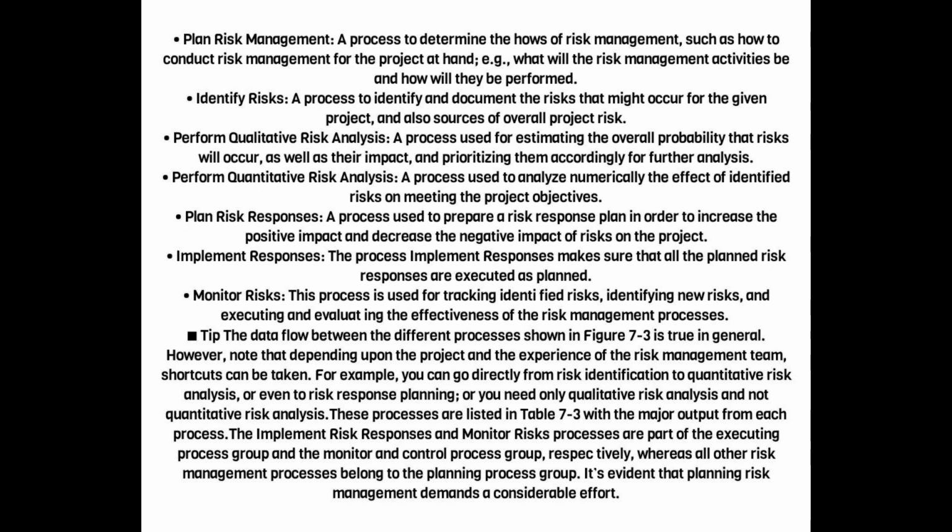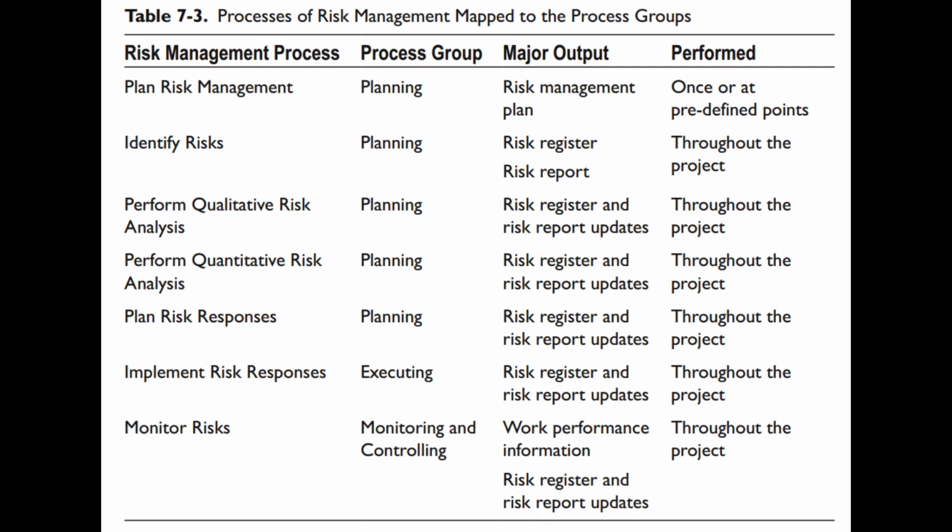The implement risk responses and monitor risks processes are part of the executing process group and the monitor and control process group, respectively, whereas all other risk management processes belong to the planning process group. It's evident that planning risk management demands a considerable effort.